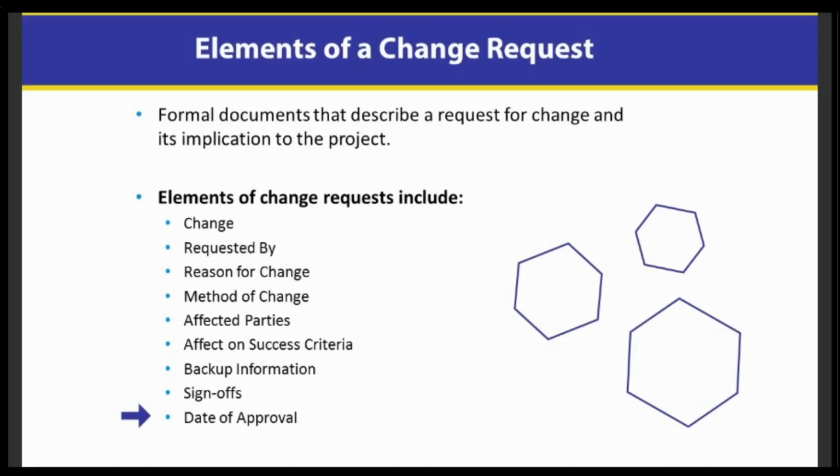So does every single change need to be documented in this sort of formal procedure? Are there small changes that we can do without going through this whole formal bureaucratic process? So this is the deal. During planning, we can change the project plan all you want. Typically, the changes will start to wane as we get closer to the start date of the project. But once the project starts, it's frozen. It's in stone. We are not going to change any activities, timelines, or costs.